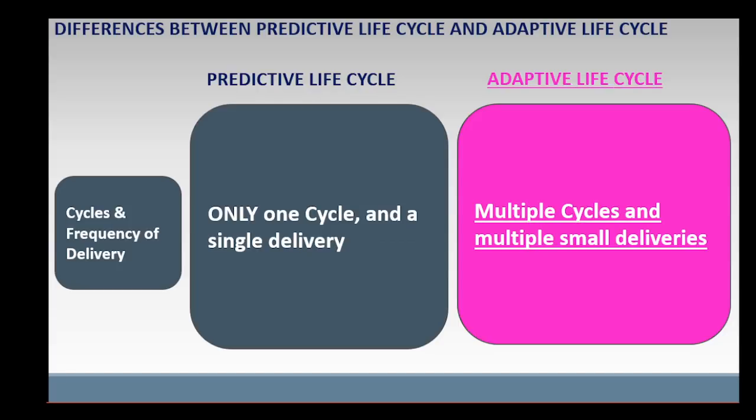In adaptive life cycle, there are multiple cycles and multiple small deliveries, one delivery in each cycle. The project is divided into smaller cycles, usually between one to four weeks. In each cycle, up to the last cycle, an increment or a small section of the product is created and could be delivered to the customer. The customer could start using an increment that has been delivered.